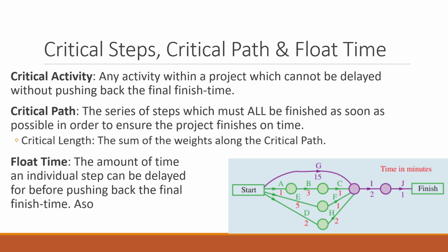Now, the reason we might use one of these networks is because we have a large amount of interdependency of tasks. So for example, activity B requires activity A to be done, and activity I actually has a large list of interdependencies because it requires activity G, activity C, activity F, and activity H. Now, most of that was information covered in 12A. That's just a light refresher for you. But the terminology on the slide here is quite important for the worked example I'm about to do.